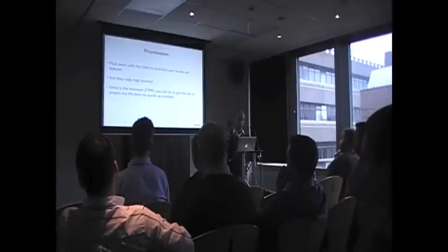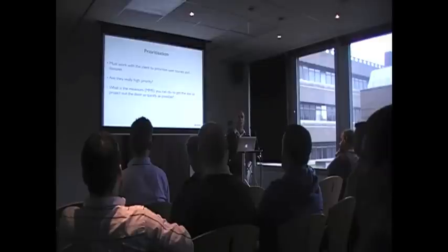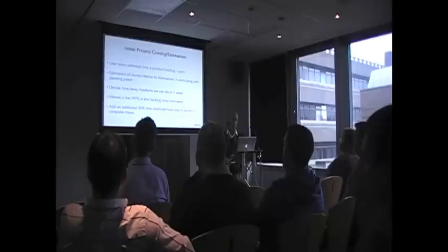And we get to this thing called MMS, which is minimal marketable subset, which is basically what do you need to get out of the door to make this project a success? What's the minimum you need to do? That's obviously based on the priority, so all the ones that we need to do need to be at the top of the list. Everything under that is, well, if we get time, we'd love to do them. All the ones down the bottom, we don't really need them, they won't have any impact at all, it's just icing on the cake. That's how we work it.